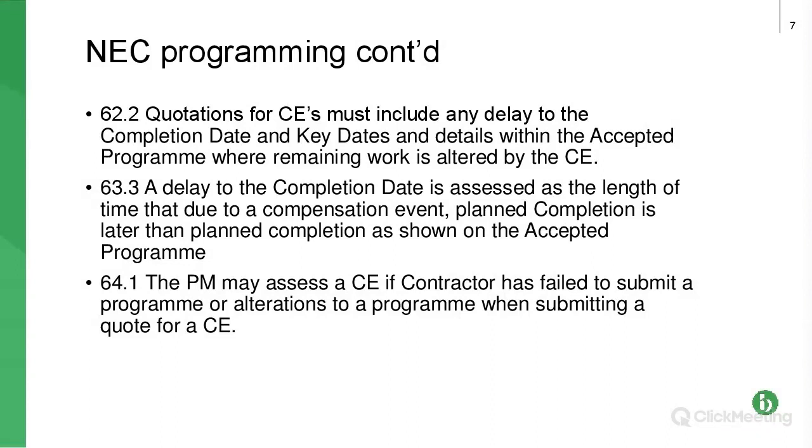So these provisions are all concerned with, so 62.2, if you're providing a quote for a compensation event, you include the money, but don't forget you also include the time, which means that you've got to include a programme, because we know that a programme has got to be supplied if the CE includes a request for extra time.